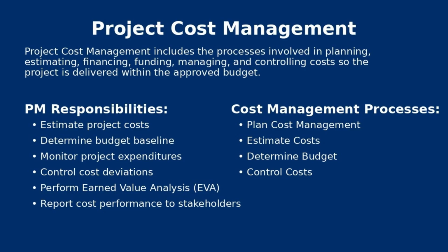When we talk about estimating, there are two techniques available. One is top-down, one is bottom-up. When you talk about top-down estimate, it is also called an analogous estimate. You do it when the project is in the initiation phase, when there is not much detailed information available. You are going to come up with a high-level project feasibility with the minimum level of information that is available. This is a very, very quick estimate. It is less accurate. It does not consider any differences between projects.